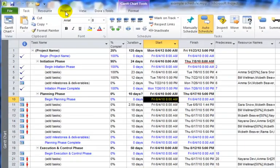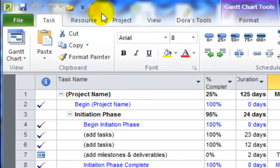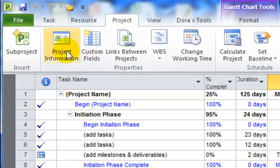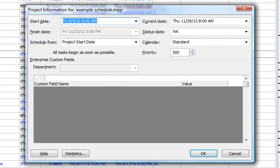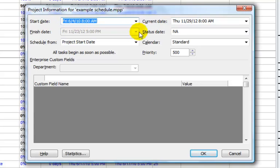From Project, if you go into the Project tab and select Project Information, the Project Information dialog box opens. You'll see there's a Start Date field, and you're able to define the start date for your project.